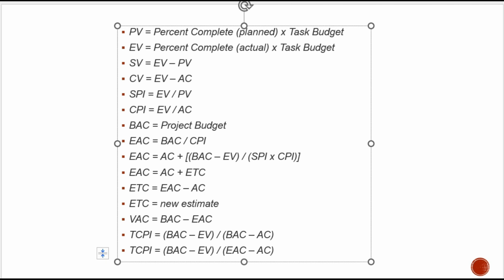There is an objective performance measurement. There is an integrated view of cost, scope, and time. It supports informed decision making. The limitation is that it requires accurate and timely data. This may not reflect the quality or the customer satisfaction, and this process is a little complex for small or agile projects. Earned value analysis is a powerful tool for monitoring projects.